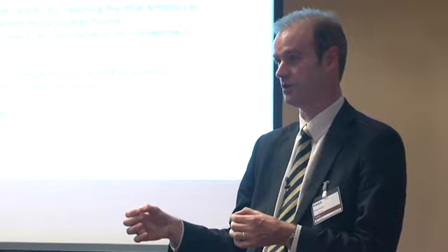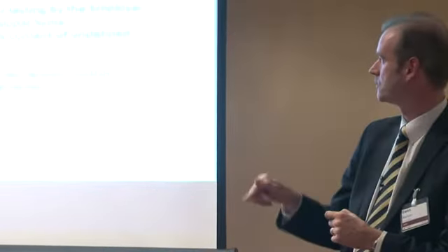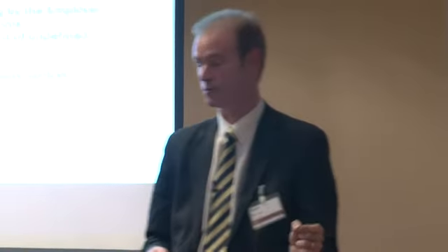So if I give an example of excavation activity, 14-day estimate, you might allow an extra day for any risks that occur, and you will show on your programme a 15-day duration. But crucially, under the NEC form of contract, it says the contractor owns that time risk allowance. And if you want to show your time risk allowance on your programme, of that 15-day activity, I would recommend that you put it in the spreadsheet part of your programme to show that time risk allowance of 1 day. And it's not there for the employer to absorb any employer delays.